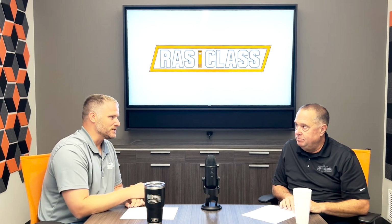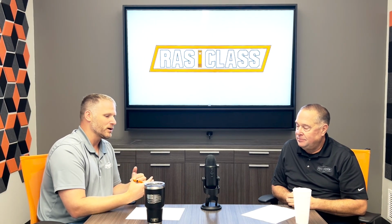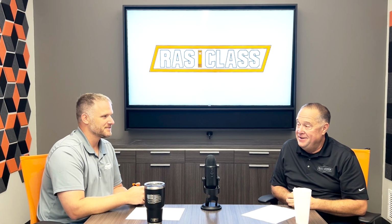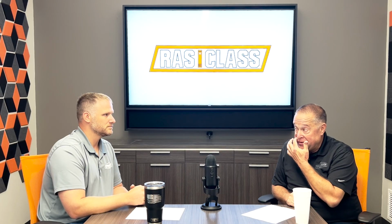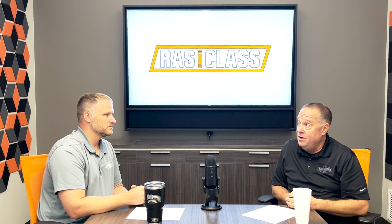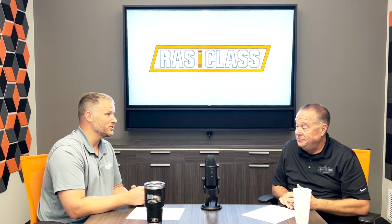What about success stories? Do you have any stories that stand out where it's like, man, this one went really smooth? How fast did you get the boiler up? My favorite success story is with one of our partner companies. We picked up a brand new 1,000 horse mobile boiler room in Kansas from the manufacturer. It had just been completed, never fired before. We picked it up at noon on Friday, and we had it online running and inspected by 3 o'clock Sunday afternoon. Wow. So 2 days. 2 days, 48 hours.